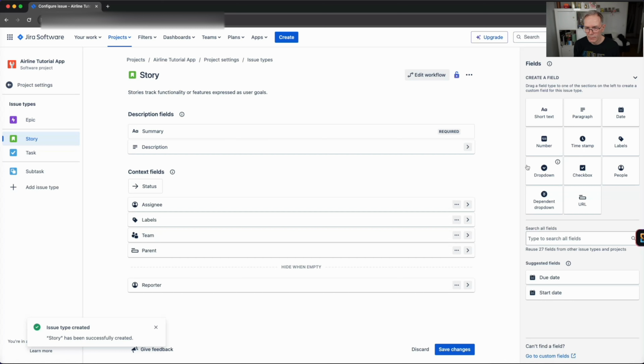So what is really required for a good user story is acceptance criteria, definition of done, and if you use the INVEST criteria, which I truly recommend for discussion purposes in your team when you are discussing through these user stories, what you have and what you create, then it's good to have at least these 3 additional fields. And JIRA makes it quite easy to do that.